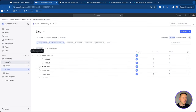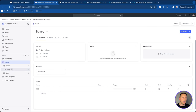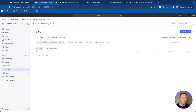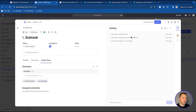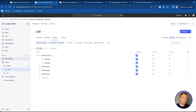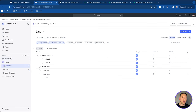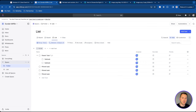Remember: spaces, folders, lists, parent tasks, subtasks, and checklists within each task. This is very important to set up correctly so that you can build the rest of your workspace and make it play well with views and other features in the future.